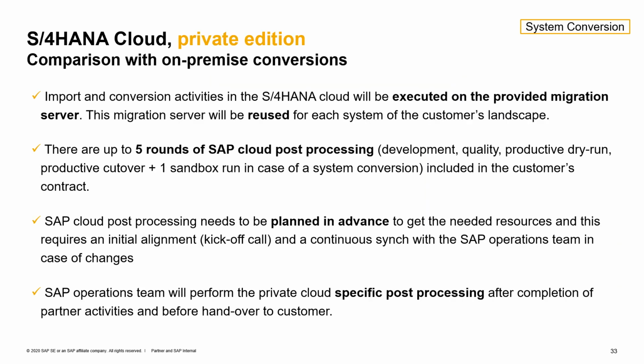After having seen the detailed procedure, let's have a look into some important considerations on the comparison with the standard on-premise conversion. The first part is that all the import or conversion activities in the S4HANA Cloud Private Edition are executed on the provided migration server and not on the final application server itself. The migration server will be reused for each system of the customer landscape, and for each iteration you will decide to execute. And for this, it is important to clean up the migration server after each round of conversion.